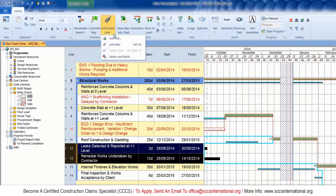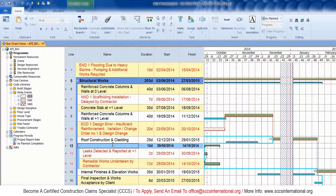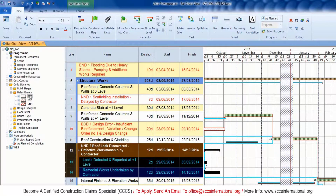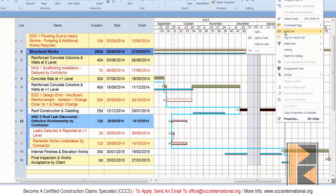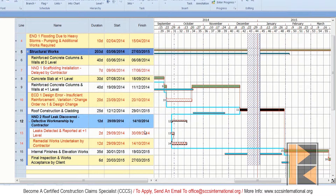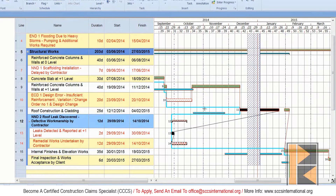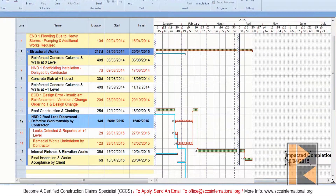Now that the durations have been entered for the delay events, I'm going to summarize the fragment. Subsequently, the fragment will be logically inserted into the program by linking it to the roof construction and cladding activity. The fragment has now been logically linked and inserted. Now it's time to reschedule the program and note the negative impact to the critical path and the project completion date.